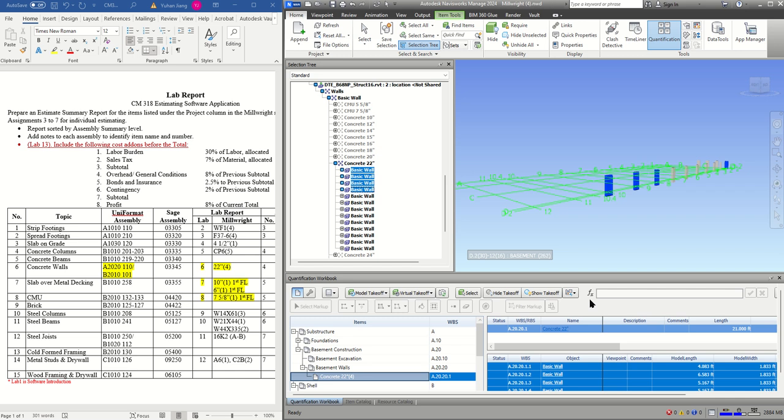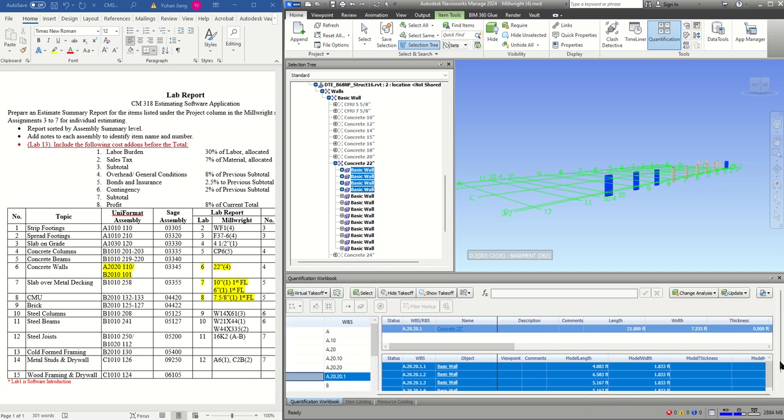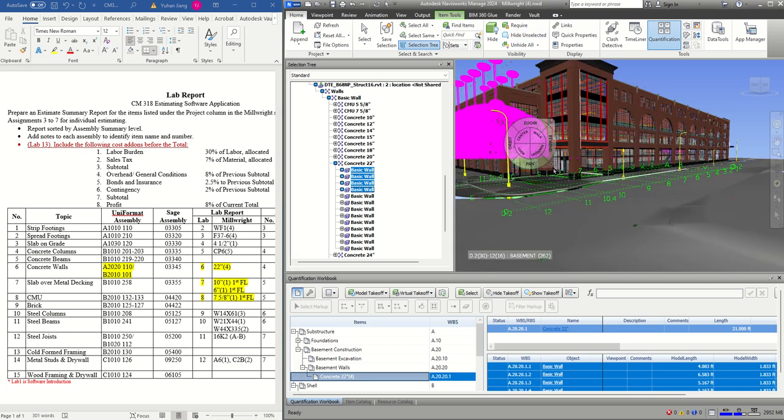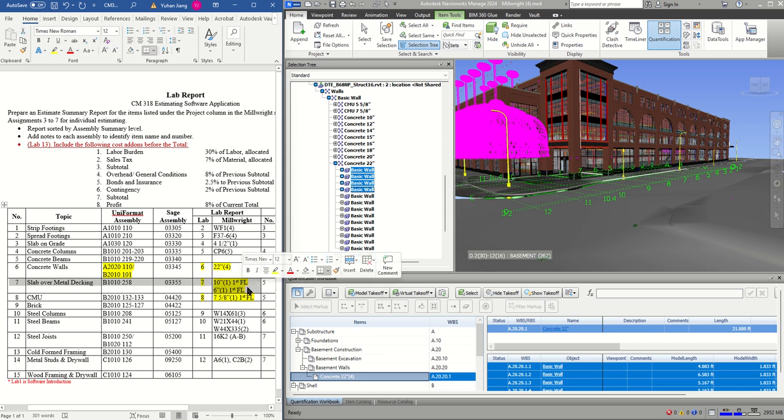Okay. So this is your down with your slabs. Basically, if this were the purpose, we would go here and do exports, with the selected quantity to Excel. But since we're trying to combine those together, we continue doing the takeoff. So now you unselect all, and you will see the model again. Now we're going to find out where your slab or metal decking is, and what section is it in? So substructure. You're doing the substructure, basement construction and the basement wall.